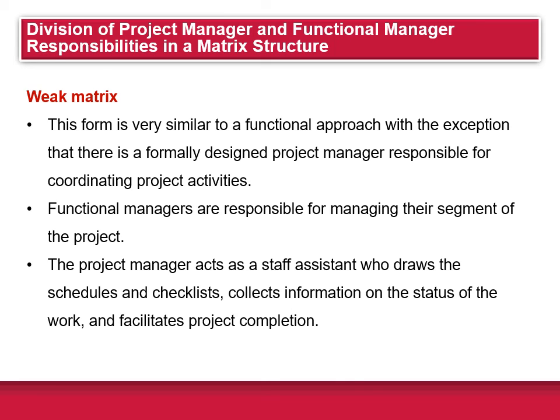So in practice, there are really different kinds of matrix systems depending on the relative authority of the project and functional managers. The first one, let's talk about what's called a weak matrix. This is very similar to the functional approach, with the exception that there's a formally designated project manager responsible for coordinating project activities. The functional managers are responsible for managing their segment of the project. The project manager acts as a staff assistant, who draws the schedules and checklists and collects information on the status of the work and facilitates the project completion.